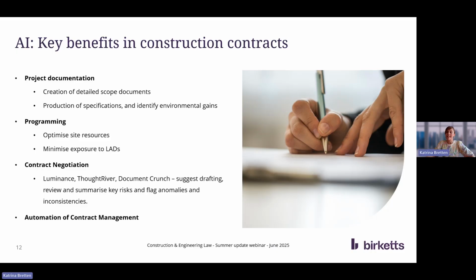And finally, AI also allows for greater efficiency and efficacy when it comes to managing the contract itself. It can automatically monitor all contractual obligations, generate detailed summaries of those obligations and liabilities into a single document, and alert users to approaching deadlines. Additionally, AI is able to assess and alert users to differences and anomalies between different forms of contract, enabling users to better focus on the key requirements of particular sites and schemes.